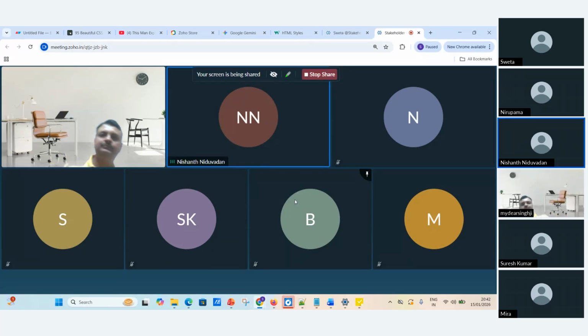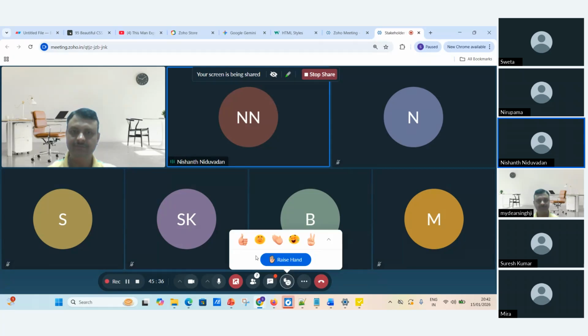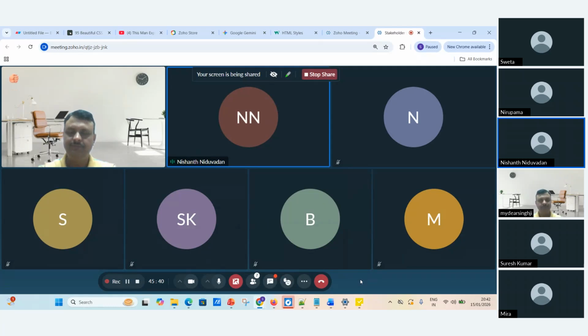For a traditional project, I think we should go with a change management or change control process. The stakeholder should be notified to raise a change request, and as a project manager, it becomes your responsibility to share the template, which helps describe the change, the impact of the change, and the cost associated.